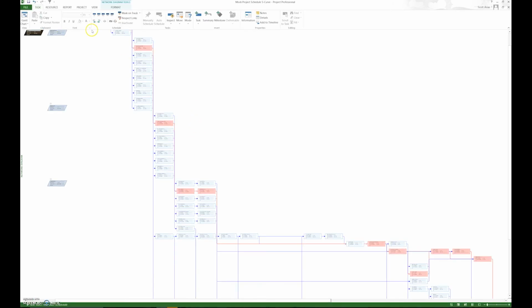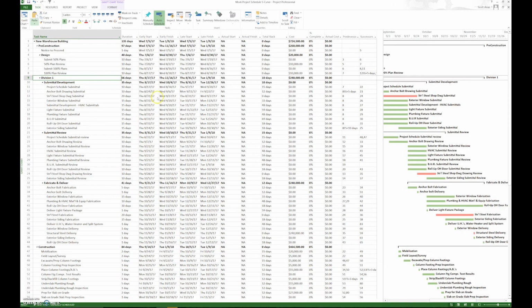So that covers the reports that we're required to submit. If it has a scheduling spec, it may require more than that, but the basic reports are a banded report, a continuous flow report, an earned value report, and a narrative.